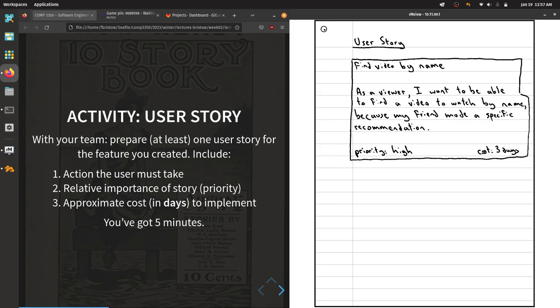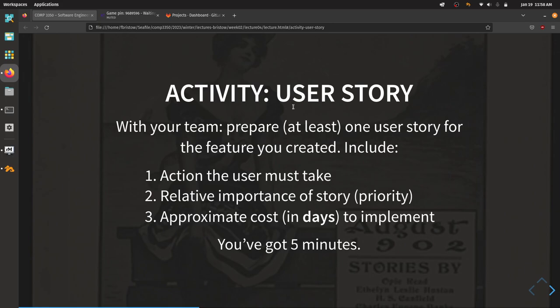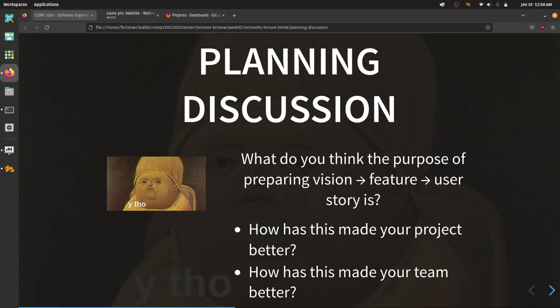The other thing I frequently say is to avoid writing 'as a user' — try to make the person you're targeting a little more real. If you've done HCI before, you've probably built personas. I don't want to get into that much detail, but make a bit of effort to give them a classification: as a viewer, as an administrator, as a content manager or content creator. That level of specificity — this is the person doing this task — is better than just 'as a user.'